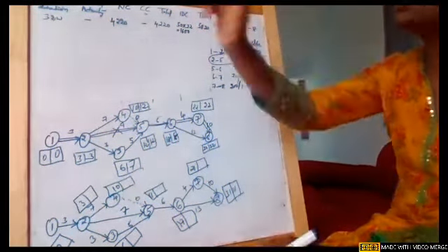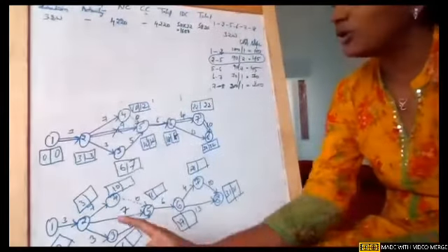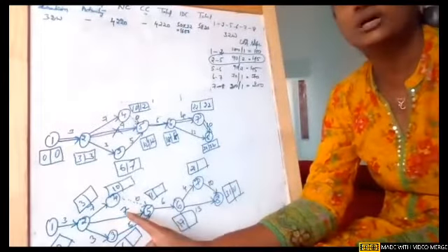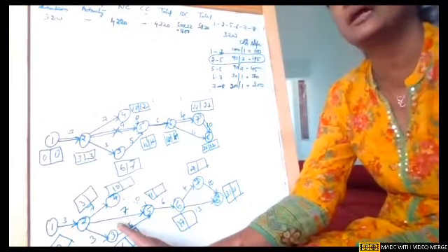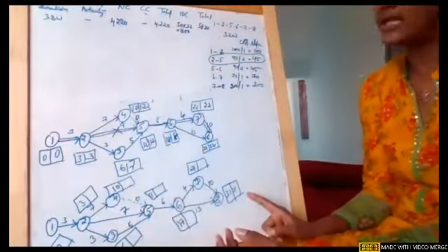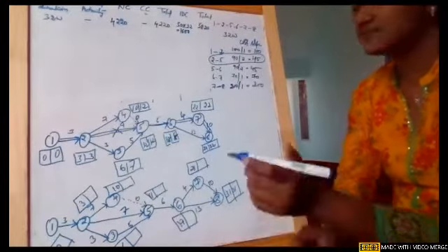So this is how the duration is. Earlier it was 32 weeks. Now it has been reduced by 1 week. Though in the 2 to 5 activity, earlier it was 9 weeks, we reduced it to 7 weeks. Though here there is a reduction of 2 weeks, overall we cannot say it will be minus 2. It can be minus 1 as well.